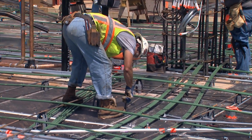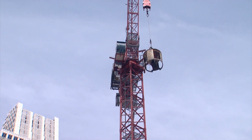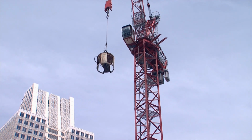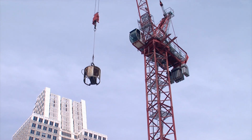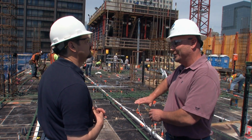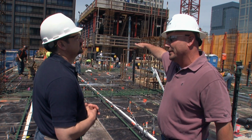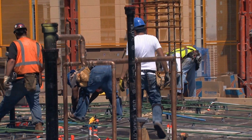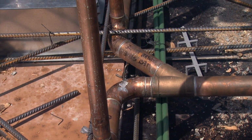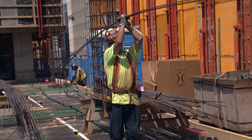At what point are you ready before the pour? You said this is roughly a 2-day process here? A lot of times what will happen, we've got this thing dialed in so well on this project that around 4:30 tonight, all activities will cease and desist. Really? Tomorrow morning we'll be up here and actually pouring already. A lot of times the roughing's actually taking place as we're coming across, so if we're starting the concrete pour over here on the east side, working to the west, the guys will still be roughing in over here. We've got this thing dialed in so well that we're actually able to get it in the night before and just pour the concrete by 11 o'clock. The next morning we're poured out, we're recouping materials, bringing it up, going up to the next level and making our column pours that night.